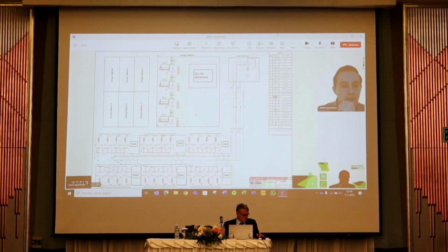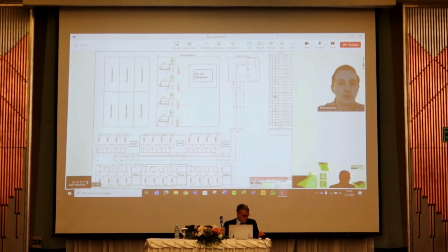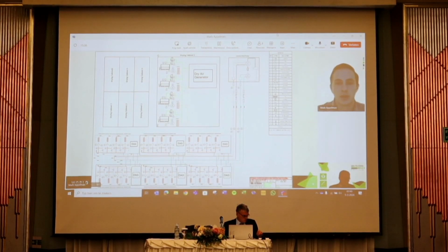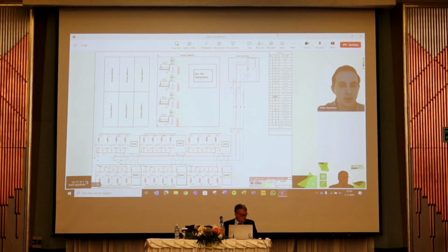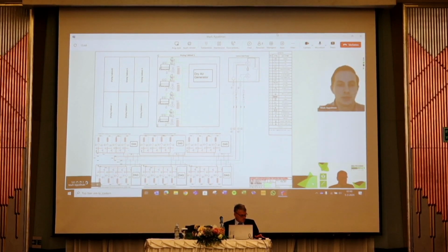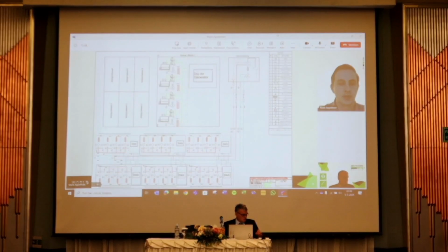And when we start making these kind of drawings, like the PNID or the 2D flow, this is also shared with you, so you can discuss that internally in your project team to review it, and afterwards to give an agreement to us. Okay, so this will work for us, and then it's a go moment for us to proceed with the process.